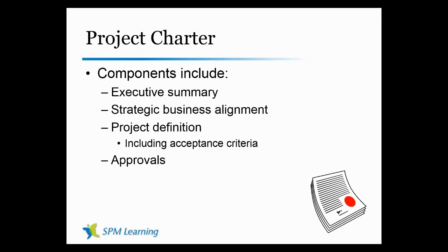So the deliverable on our first project was simply the report, and then based on the information in that report, we were now able to make our decision to decide what solution we could actually go to. So here we had a project where the product or the deliverable or the solution was simply some information that would help us get to the definition of the product or solution. So you really want to be very clear as to what you're actually delivering here. Okay? And don't be afraid to say, you know what, we don't really know what the full solution is. We don't even really know what the full problem is. We need to do some analysis and dig into that.